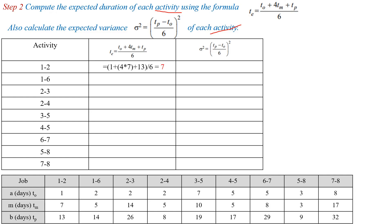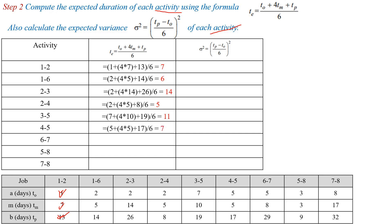For activity 1 to 2, T0 is 1, TM is 7, and TP is 13. Then TE = (1 + 4×7 + 13) / 6, which gives TE = 7. Similarly, for activity 1 to 6 TE = 6; activity 2 to 3 TE = 14; activity 2 to 4 TE = 5; activity 3 to 5 TE = 11; activity 6 to 7 TE = 11; activity 4 to 5 TE = 7; activity 5 to 8 TE = 4.